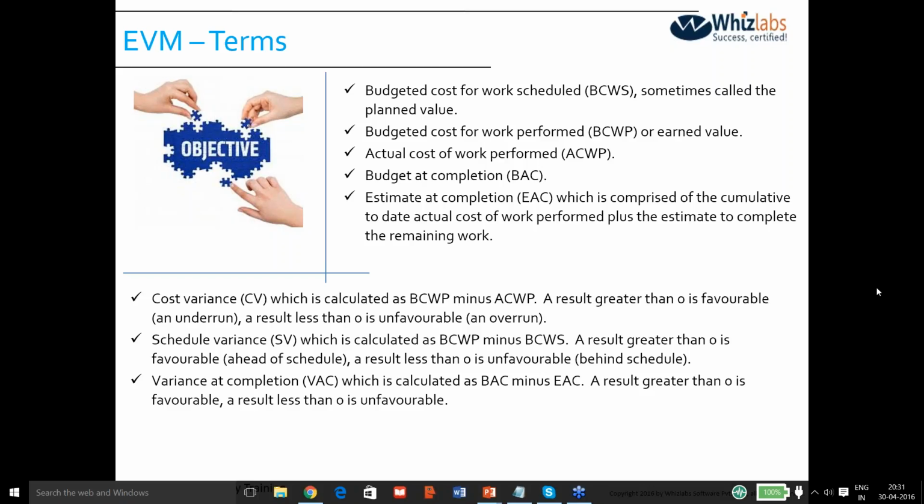As long as the customer is not asking for more. So instead of maybe 4 floors, he's saying, okay, now I need 5 floors, or maybe I need 3 floors. In that case, the budget will change. Otherwise, your budget will remain the same. This is called the baseline budget, because against this budget only, against that plan only, we would be comparing the actual progress.